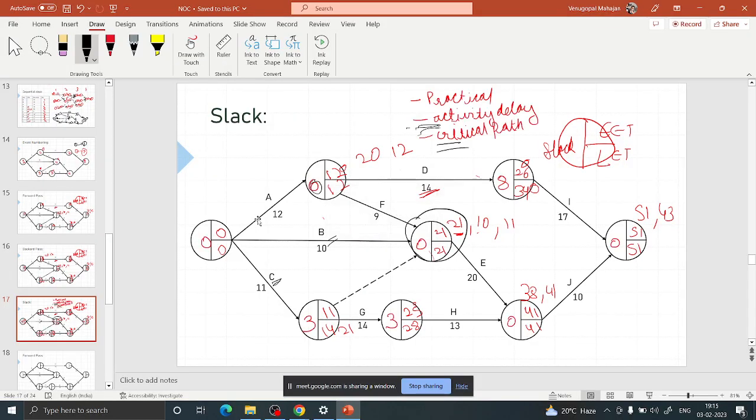Sir, permit me to say something frivolous, if you allow me. Yeah, definitely. Sometimes you tend to look at the arrow and try to see whether it is really proportional to the number below, but it's not so. It doesn't have to be. I'm just saying on a humorous note. Yeah, it's unlike a Gantt chart, where it is up to scale. This is not to scale, right? People might even confuse. For example, the arrow of B is longer than A, but B takes 10 days. Yeah, that is the point.